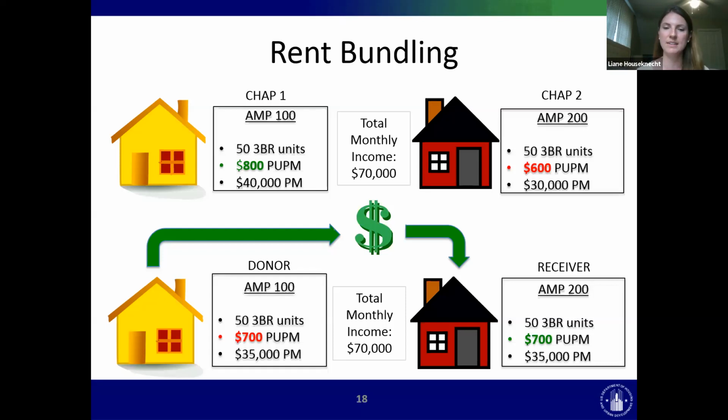But again, if tenants are going to be living at the project after closing and that conversion over to tenant paid isn't going to happen in conjunction with closing, your CHAP has to show the current configuration. So it really comes down to timing of when you're making the utility responsibility switch, and if residents are living on the site. That might be a good one to email us about, and we can talk through the timing and whether you should amend your CHAP or not.